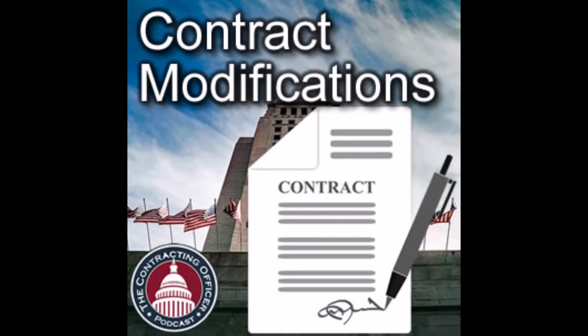Right. And it doesn't specify who approves the definition of important here or impractical. So I would say the CO has the authority to just move out. Right. This is a judgment call. And for big deals, the CO might not want to do this alone. You probably want some top cover if you're the contracting officer and it's a big change.